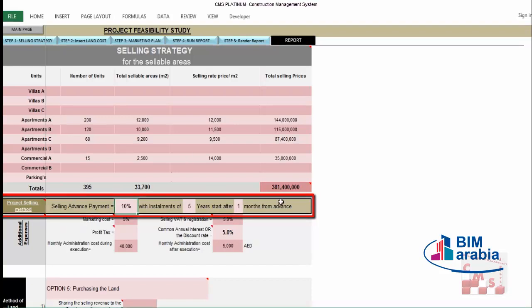Then you insert the project selling method — how you are planning to sell your units. For example, you can make a marketing plan with an advance payment and installment over years. Here we intend to make a 10% advance payment with installments over five years, starting one month after the advance. You can change this according to your requirements. CMS will give you the figures for the required amount during and after construction, so you can adjust your plan based on the report results.